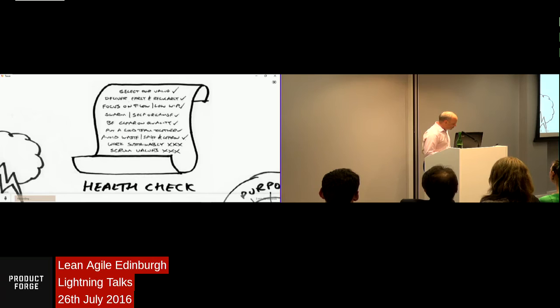Then they looked at the risk in the work, and they thought, we don't want to waste even 1 week going down a dark alley here. We want to make sure that if there's any integration work in this user story, we take that out first. So they did. They went and spiked all the risk in the first user story. Fantastic.